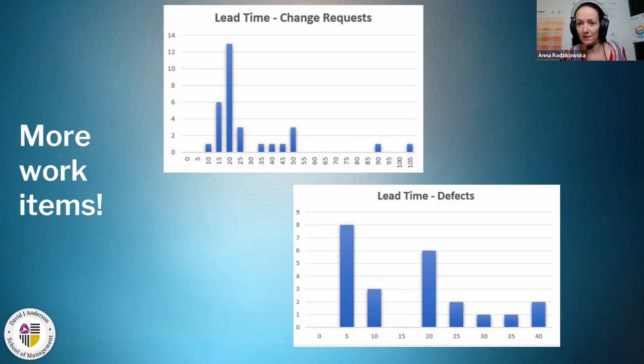So we had our delivery cycle. Every second Saturday, we had our own delivery window. And if we were able to solve and address the defect within 2 weeks, so imagine we have Saturday. On Saturday, we have deployment. Then on Monday, a business starts using the reports that we have prepared. And for some of this report, they give us feedback that there is a defect.